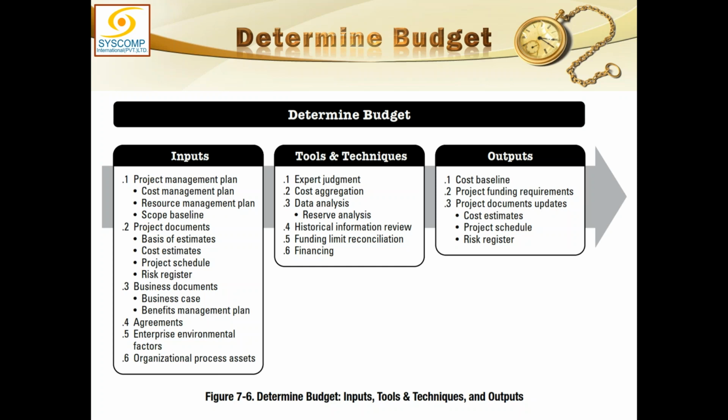If I require a certain amount of money to start the project, but that much money is not made available, then my plan will have to be changed in accordance with whatever is available. As you were saying, sometimes less money is allocated, so we plan according to that and do only as much work as could be done with that money. Maybe the next installment carries a bigger amount, and ultimately we will be able to do more.